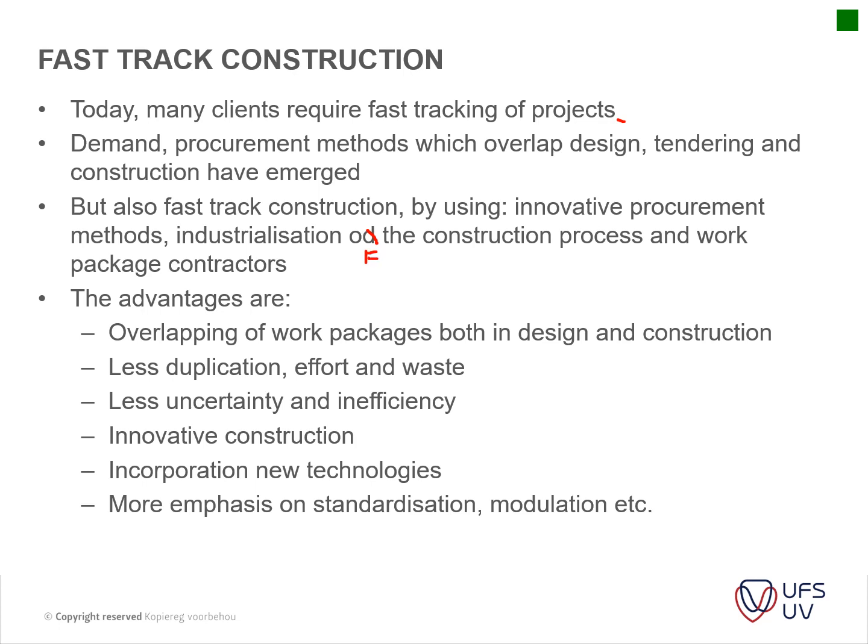So you can use all of these innovative methods. What we've done on certain projects is, in the tender document, we moved some of the design responsibilities towards the contractor. For instance, if it's a big mechanical installation, the mechanical supplier and installer actually does the design and the installation of the works, so you've got work packages like that which you just manage.